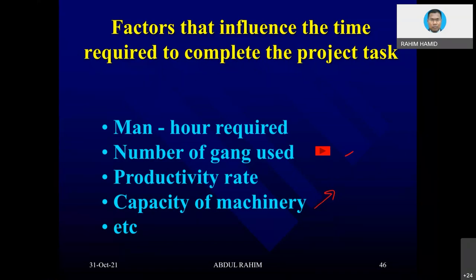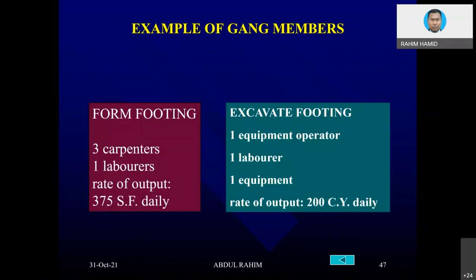Example of gang members: certain jobs can be done by one person, others need two or three people as a crew or gang. A gang requires not only people but also tools and machinery — it is a combination of people, tools, and machines working together. We should consider productivity based on a gang, not based on an individual. For example, forming footing: one gang of three carpenters and one helper has an output capacity of 375 square feet per day.